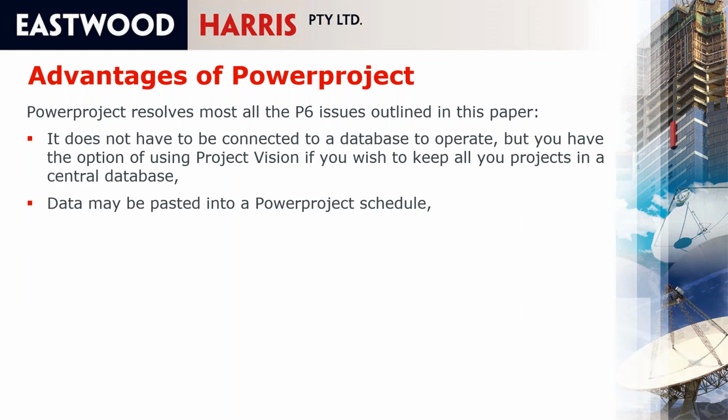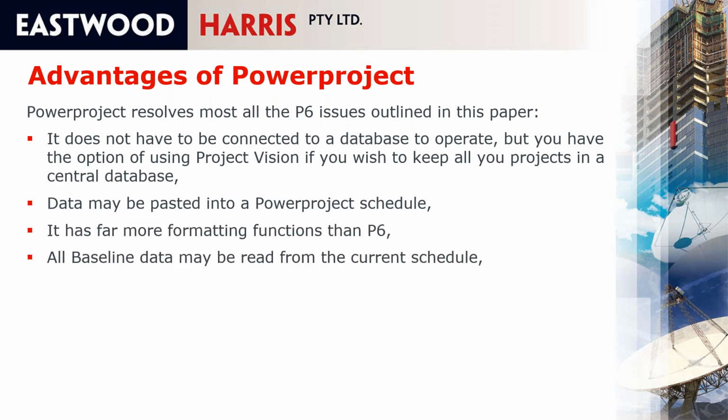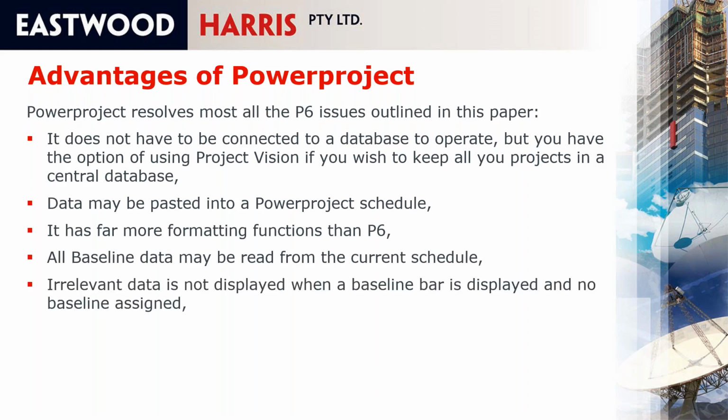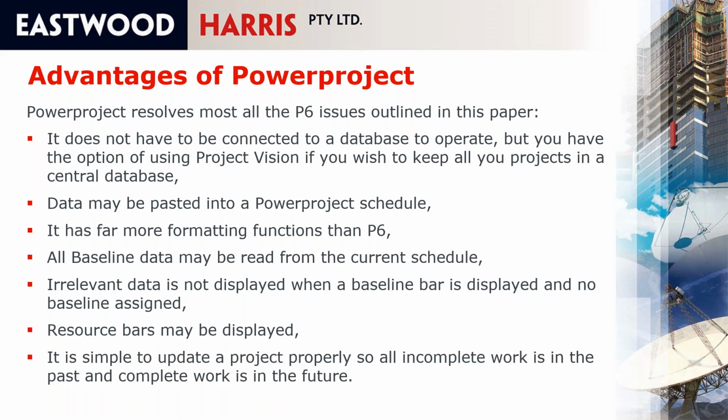Data may be pasted into a Powerproject schedule, and as people know, you can't copy and paste from Excel into P6. It has far more formatting functions. All baseline data may be read from the current schedule. Irrelevant data is not displayed when baseline data is displayed with no baseline assigned. Resource bars may be displayed, and it's simple to update a project properly, so all the incomplete work is in the future and complete work is in the past.